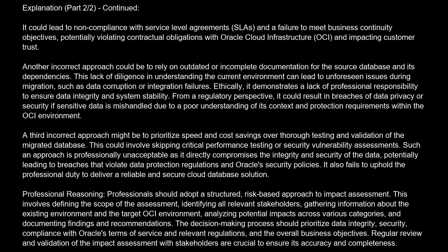Professional reasoning. Professionals should adopt a structured, risk-based approach to impact assessment. This involves defining the scope of the assessment, identifying all relevant stakeholders, gathering information about the existing environment and the target OCI environment, analyzing potential impacts across various categories, and documenting findings and recommendations. The decision-making process should prioritize data integrity, security, compliance with Oracle's terms of service and relevant regulations, and the overall business objectives. Regular review and validation of the impact assessment with stakeholders are crucial to ensure its accuracy and completeness.